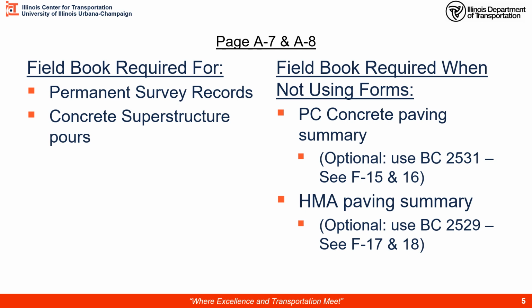What are some of the requirements for field books? Like I said, if you go to your doc guide, page A7 and 8, we can look and see what some of the requirements are. Field books must be hardbound. They cannot be spiral bound.